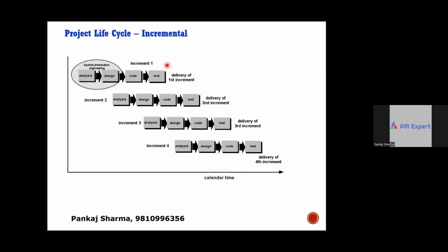Is the project still a value for money proposal? Does the project still have a viable, desirable, achievable, and sustainable business case? Does the project still have continued business justification? If the project is no more a worthwhile investment proposition, you will either stop or change the direction.